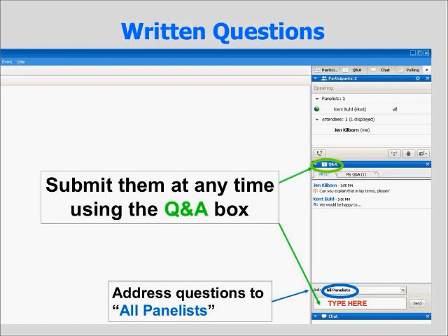Strictly speaking, you should be looking at all roads within 1,000 feet and doing the assessment, and then you look at the buildings and you do the barrier analysis, and you say, there's a barrier, it doesn't work. Some field environmental officers will let you shortcut that, and they'll say, gee, there's a solid row of buildings, you can't see the highway, this roadway, no way, don't worry about it.